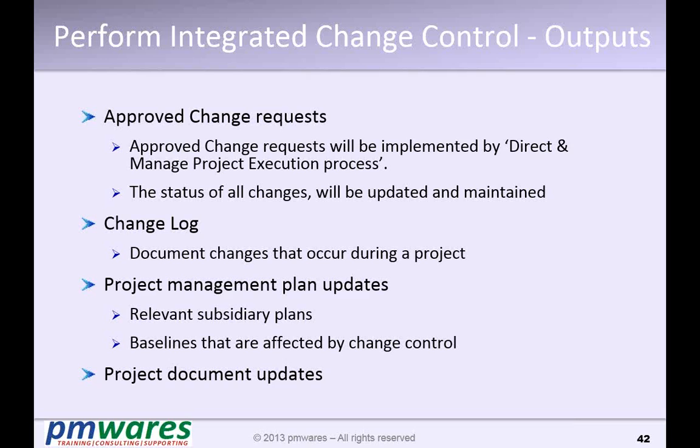Now the change control board will sit on it, will see the impact, will see the change and see the value the change is bringing, compare the impact and the value the change is bringing, and it is approved or disapproved. If it is rejected, it is dropped. If it is approved, then it will go to the project execution as an input and get implemented.